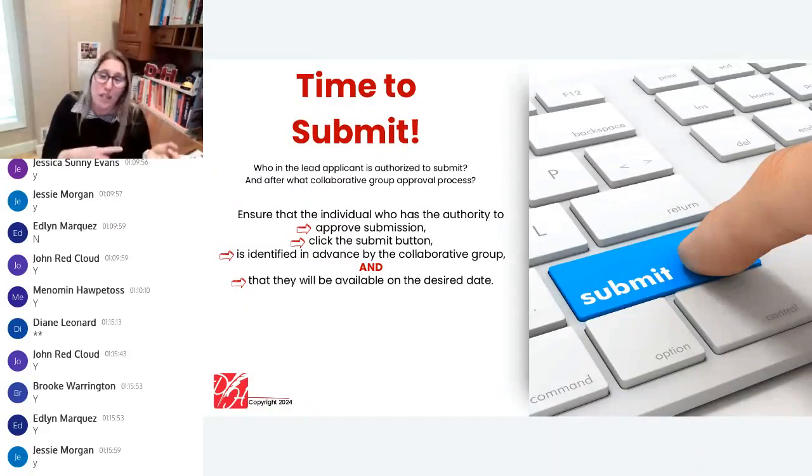Because you've already talked about submitting during your team working agreement, by the time you get towards submission, you know who's authorized to submit. Hopefully you did check their calendar to make sure that they are not out of the office. By planning to submit early in case they happen to be out unexpectedly ill or have a different personal matter that keeps them from being available, it's okay. Still have a few days. You've got a little buffer that you built into your calendar. It'll be all right. We'll still get there.